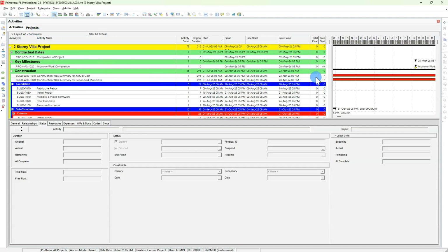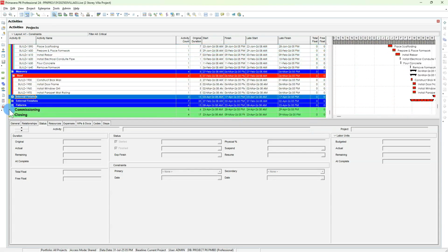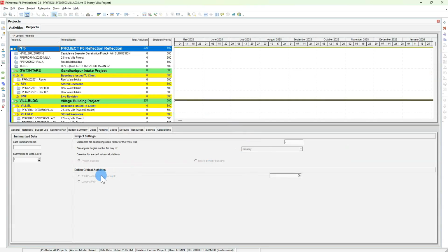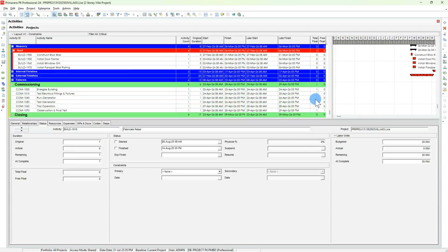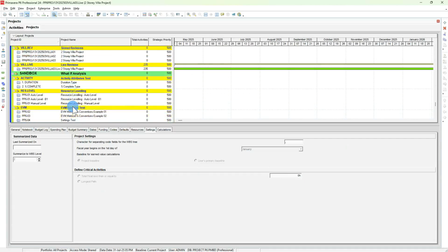because you see here the total float is 1 day, meaning 8 hours. That means it is putting it here, and probably we can see some tasks, see here, this is also with 1 day float. So we are saying that equal to or less than 8 hours should be on the critical path. That means 1, 2, 3, 4. So better to put here less, so that